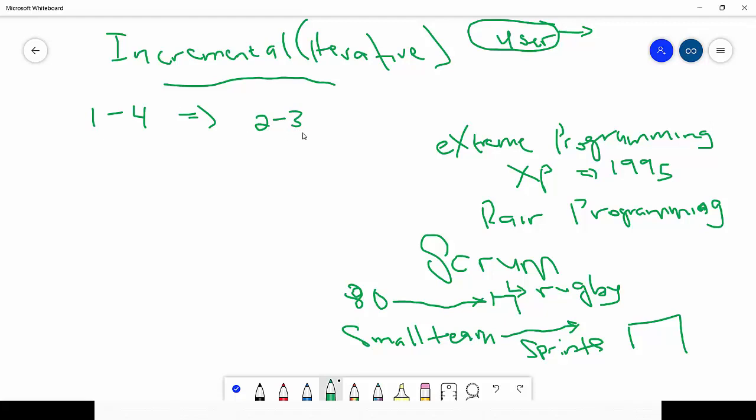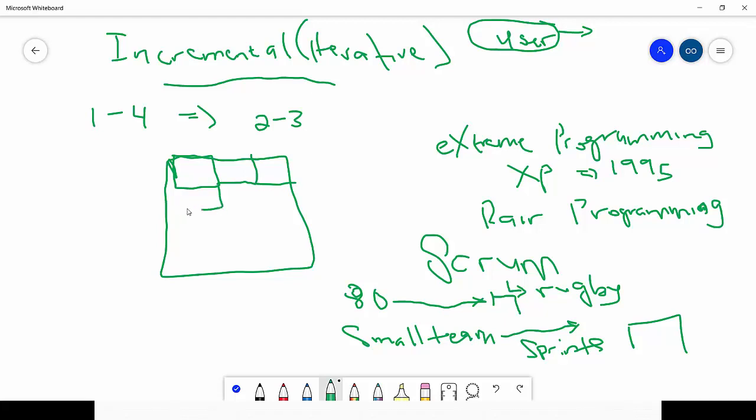Another sprint starts. So the goal of the sprint is to take a small part of the project, just like we talked about. If this is the whole project, just take a small part of the whole project, which is like a feature, and deliver this small part in 2 to 3 weeks. That's a sprint. Then you start another sprint, you develop another feature, start another sprint until you touch every part of this project and you finish them.